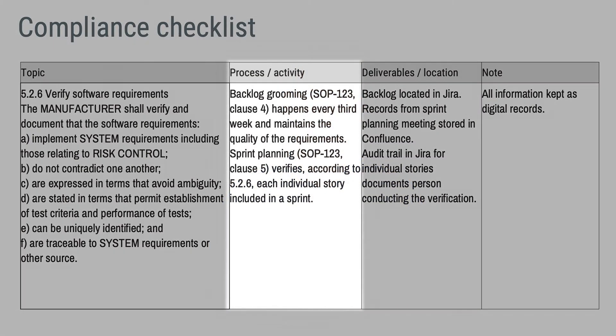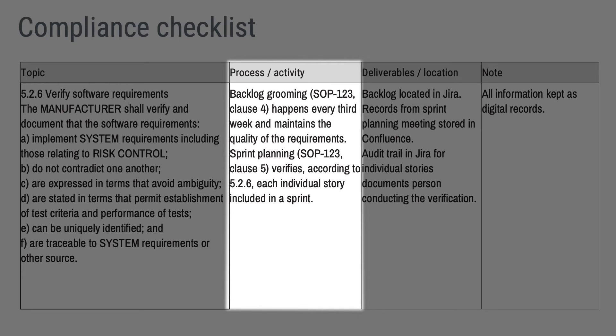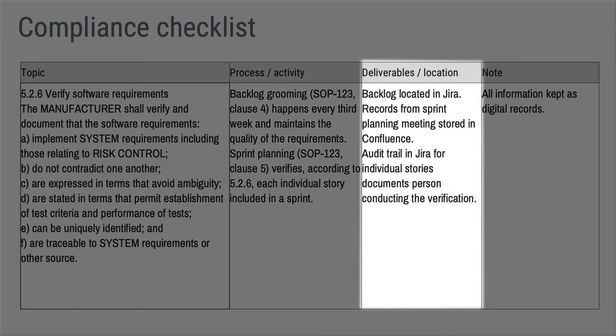Let's see how this can be captured in a checklist, starting with the Scrum approach. For the process, I provide a high-level explanation with references to a standard operating procedure, also known as SOP. In this example, I claim that the actual verification of requirements happens in the sprint planning activity. I point out both deliverables and where to find information. The requirements are kept through stories in a tool called Jira. Records from sprint planning are kept within a wiki tool called Confluence. The audit trail for stories shows who conducted the review. Note that for this example, no information is kept on paper - this is perfectly fine because all information is there and I argue it is documented.